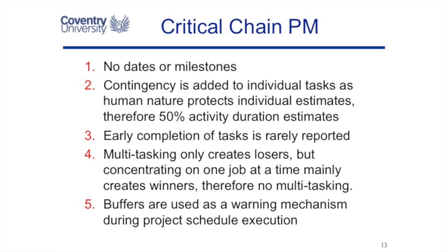The fifth concept of critical chain project management is that we're going to use buffers. That extra time that we've taken away from people when we cut their durations in two — we're going to put some of it in a buffer such that tasks can expand into that buffer.